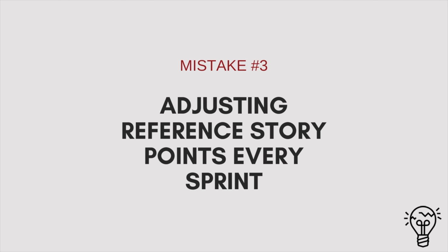If you, as a Scrum Master, see this happening, try to encourage your team to discuss the opposing viewpoints and the outlier estimates. Letting each person explain the reason for their assessment will render greater clarity and understanding of the work involved. Mistake number 3, adjusting reference story points every sprint.